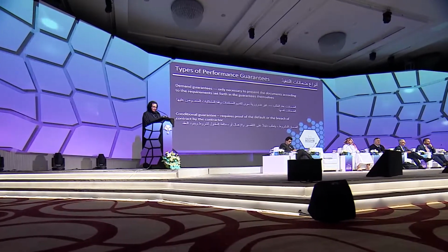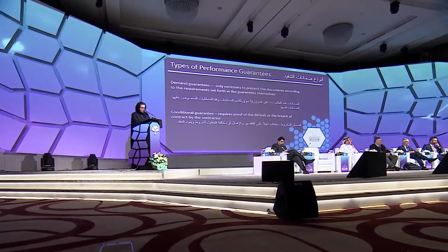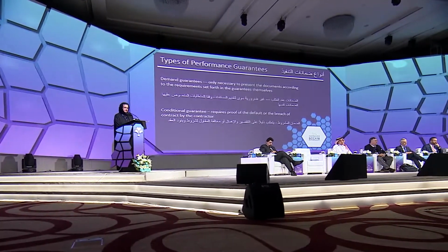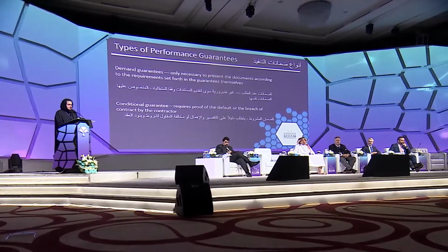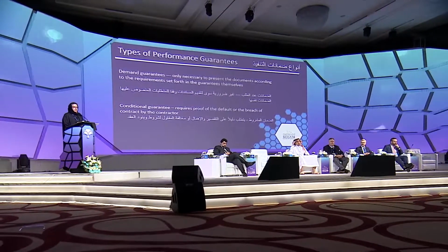There are essentially two types of guarantees: those payable on demand and those requiring payment when substantial conditions have been satisfied by the beneficiary of the guarantee. More specifically, the security itself will impose on the issuer one of two obligations. It'll impose either a primary obligation to pay a specified sum of money on the occurrence of an event, which often is easily demonstratable, or the presentation of particular documentation. The alternative is to impose a secondary obligation on the issuer.